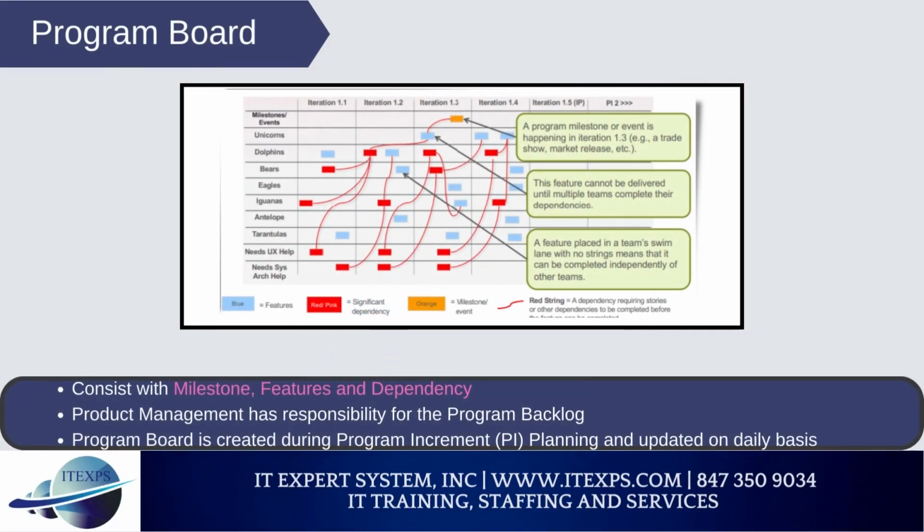Program board. It consists of milestones, features, and dependencies. Product management has responsibility for the program backlog. The program board is created during program increment PI planning and updated on a daily basis.